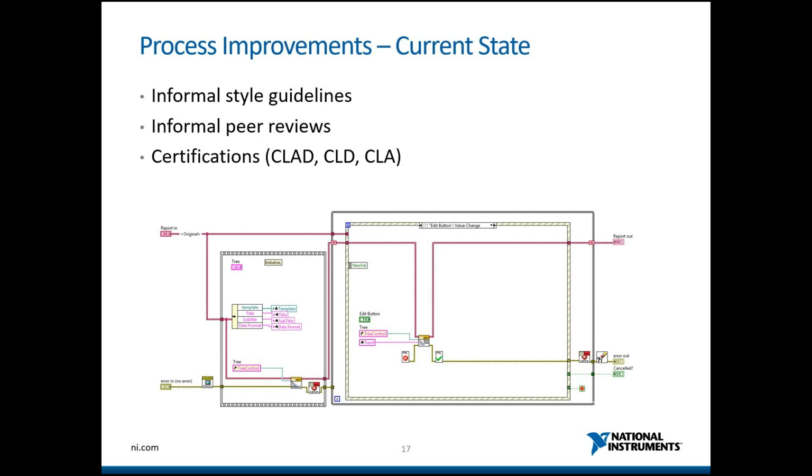And then I would add on, okay, to do alarming, we'll add an alarming module. To do logging to disk, we'll add a logging module. When you break it down like that, it's a lot easier to estimate the smaller chunks. It's also difficult to do that type of estimating when you've already got a big, huge mess, and you're trying to pick out pieces of it. That's a lot harder. So I don't know if I answered your questions, Christian and Luis, a little bit.